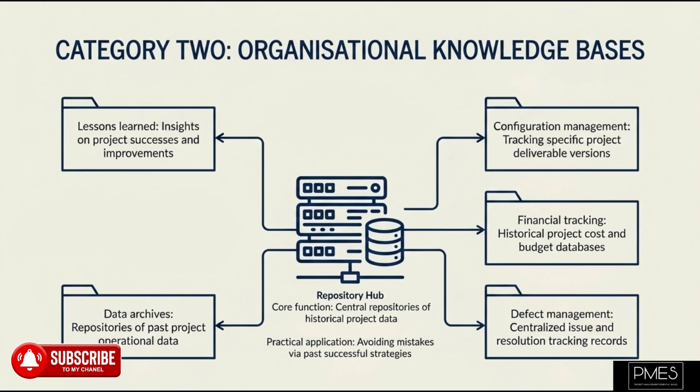Other examples of knowledge bases include configuration management databases, which track versions of project deliverables, and financial databases, containing historical cost data. Issue and defect management databases, along with data from previous projects, also form part of this category. Accessing this wealth of information helps project managers avoid past mistakes and leverage successful strategies.